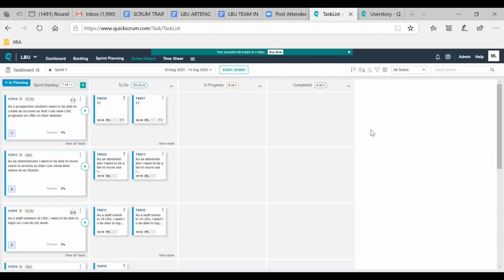Every day, before COVID, what we used to do was maybe our meeting is 9:30 every day, or maybe 10 o'clock every day. We meet at the same place at the same time for 15 minutes. The whole point of that is to create clarity, shared understanding, and progress. To say, okay, Dodie, how far now? Mary, how far now? Are you having any problems? You will see it in the document I'm sending to you.